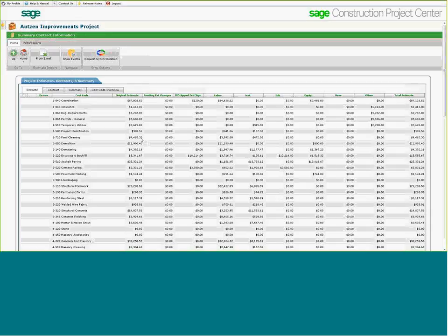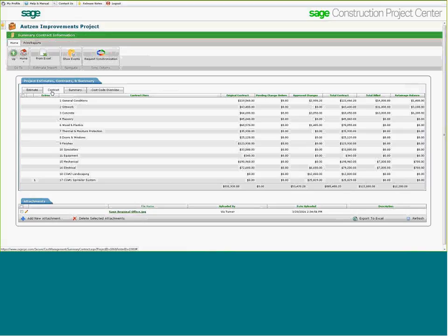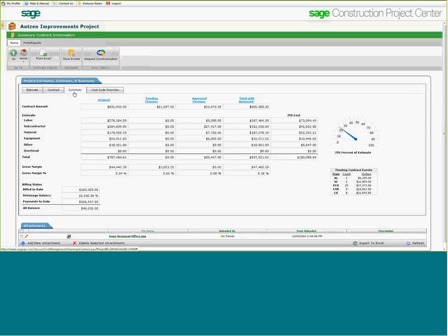So this is synced in with job cost in the system, allowing me to see my estimate flow through from the accounting. I can see my schedule of values for my contract come over. And a couple columns you'll notice here, we can show all pending change orders, what's been approved, what's been billed. We're connecting with accounts receivable to show you that balance, as well as what our retainage balances are for a particular job. I can pull up the summary and see all of my major information in one screen. Here's my contract, what's pending, what changes have been approved, the total, with little links to take me to those individual places.